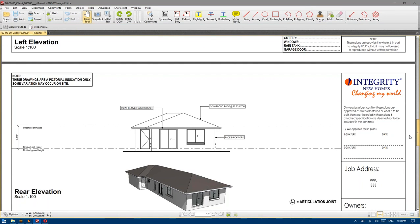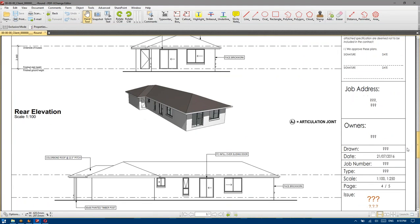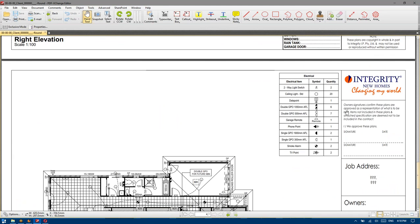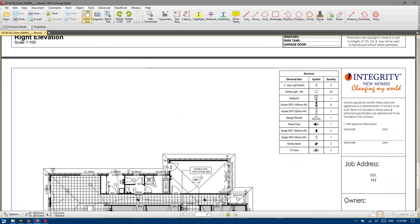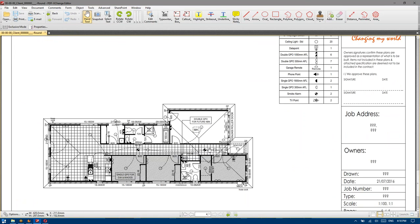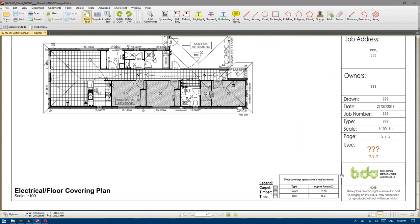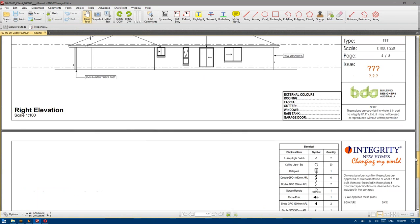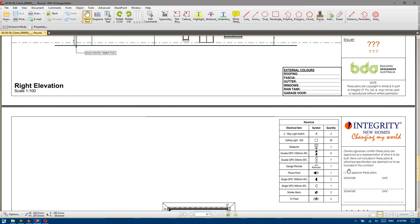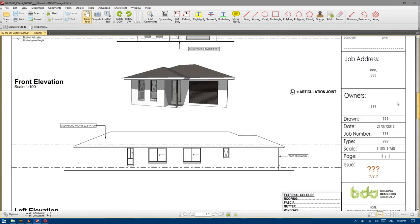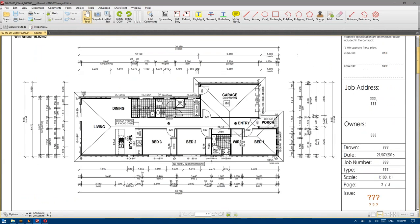And standard face brick. 90mm painted timber posts — that's our standard. Lighting plan seems quite basic and fits in with our standard inclusions of pretty much one light per room. This plan shows floor coverings but we've specifically added a note confirming they're not included. I personally can't find anything else on this design that needs noting or adding to this price.